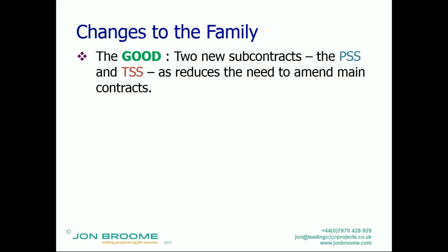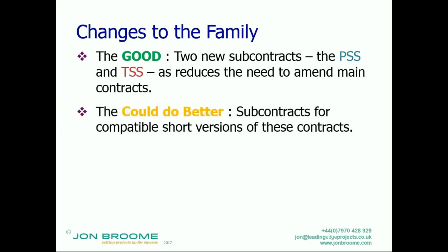Exactly the same processes, etc., but timescales for response will be slightly tweaked. So if a communication has to go down the line and then back up, the sub-consultant, for instance, has to respond within timescales to enable the consultant to respond to the service manager within the timescales of the main contract. So those are good.